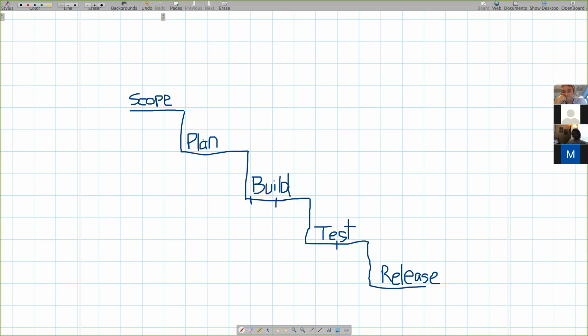People are bad at budgeting long scale time. Yeah, people are pretty bad at absolute estimation in general. Now, what's funny is that people are actually pretty decent at relative estimation. So if I say, how wide are these 4 markers? The estimates get all over the place. If I say, this marker is 3/4 of an inch across, how far across is all this? Then people are actually okay at that.